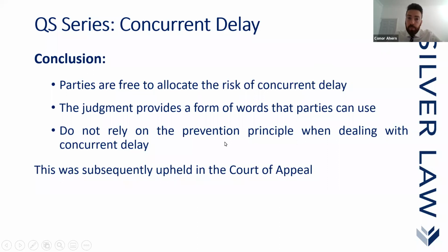We come from a position where Malmaison is largely in favor of contractors, and you can see why employers would seek to amend that. What North Midland does is basically say that if you agree to amend standard forms of contract, you can overturn the standard position on concurrency, and parties should not rely on the prevention principle as a means to defend the reversal of the concurrent position. So basically, yeah, it's a warning.